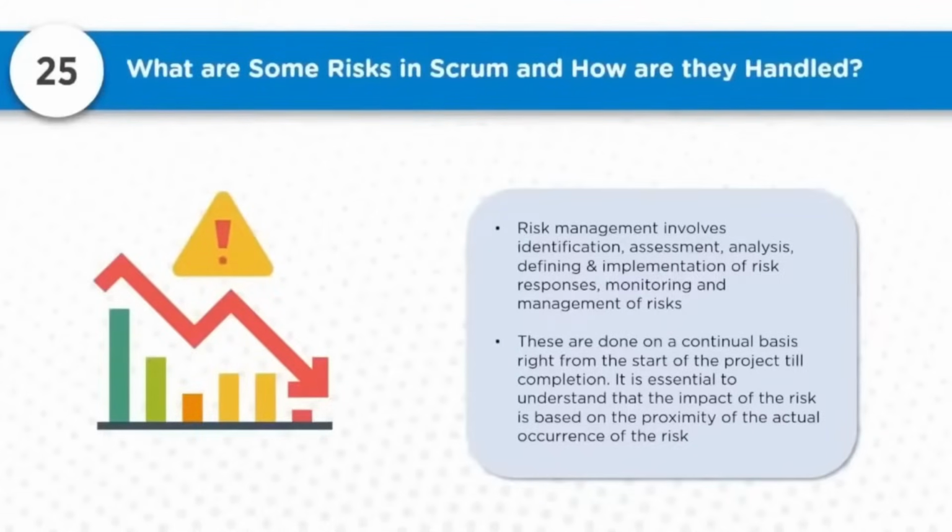So depending on the impact and probability of a risk, if it is a high impact risk, obviously you are required to do both qualitative and quantitative analysis. If it is a simple one with very little impact, you can take the call accordingly on to what extent you may require to analyze and have response plans for it. Once you have defined and implemented the response plans, quite obviously you should keep monitoring and